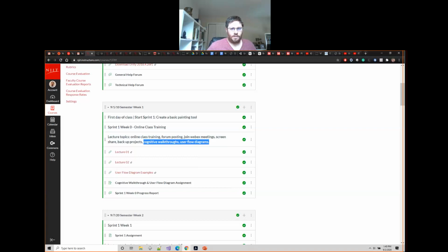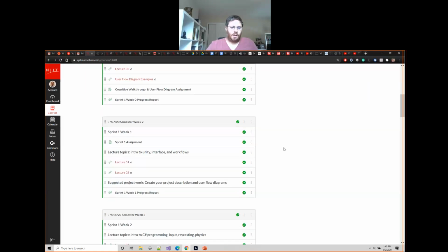All right. I'm just asking because I don't want to overstep any boundaries here if that's way too far out of line. So this first week is the same. You still have to do the cognitive walkthrough and user diagram assignment, and you still talk about your progress every week. But you're a little different where, for example, for sprint one and your first progress report, you'd have to describe the 4 features you're thinking of building for that sprint. And then you need some backups. You're like, in case this is too complex, I'm going to reduce this feature down to this.